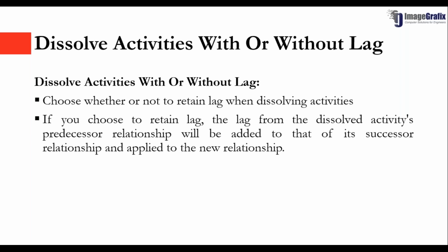You can choose whether or not to retain lag when dissolving activities using the retain lag setting in the general section of the global tab of My Preferences page. If you choose to retain lag, the lag from the dissolved activity's predecessor relationship will be added to that of its successor relationship and applied to the new relationship.